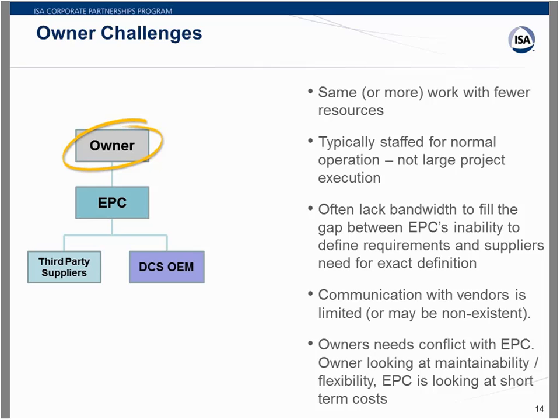And finally, the reality is that the owner's needs conflict pretty much directly with the EPC. The owner's looking for a long-term, maintainable, flexible system. The EPC is looking pretty much at short-term costs because he's responsible for the budget of the project, and he just needs to get it in, get it running, and get out.